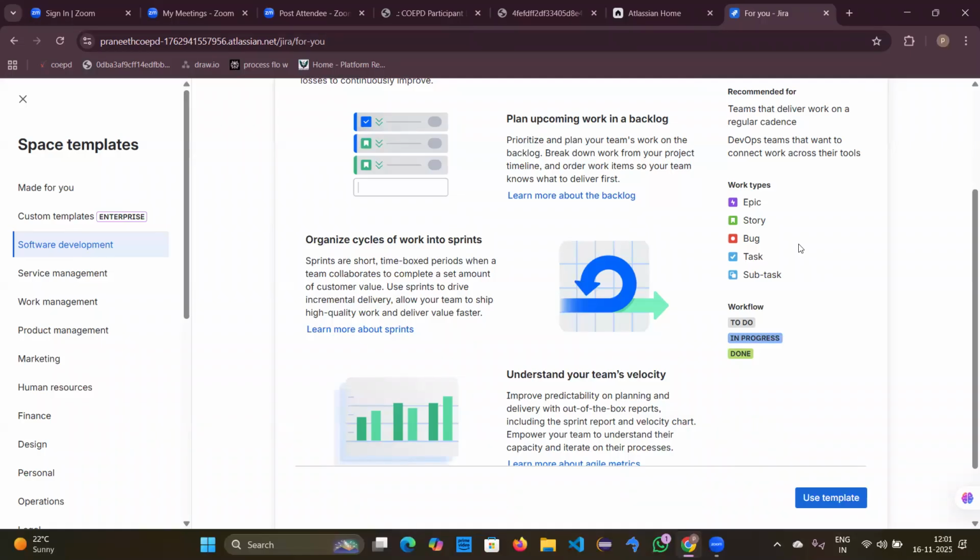For example, if you take any e-commerce application, the ordering will be there, right? So ordering of a particular product can be named as one epic. Under order management itself, we have ordering of that particular product, delivering, etc. All those things will be there, right? So those are all the sub user stories under a single epic. Okay, so I think you got this about epic and user story, right?